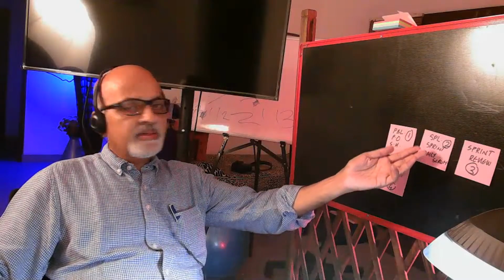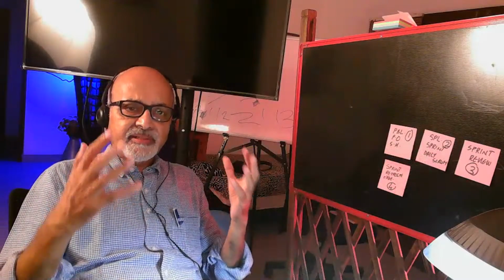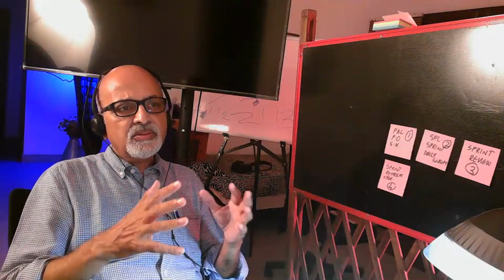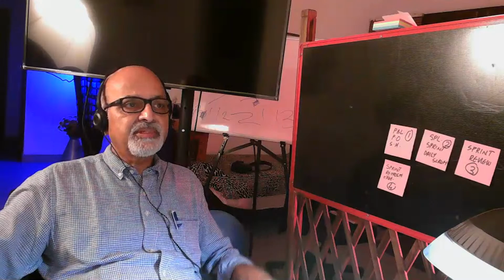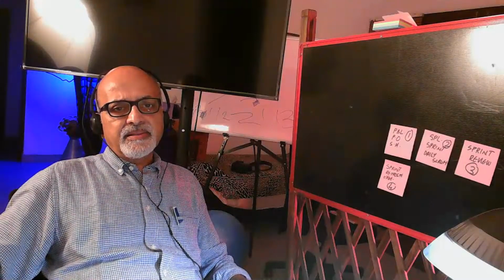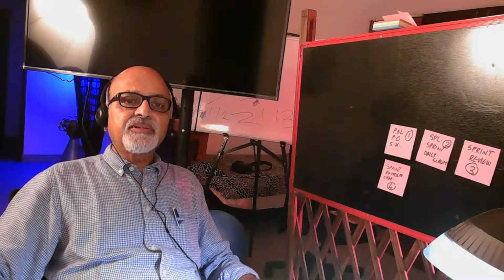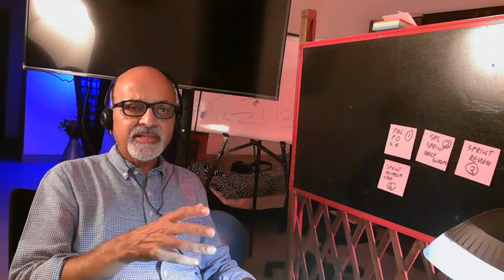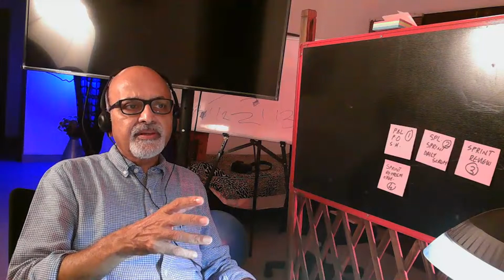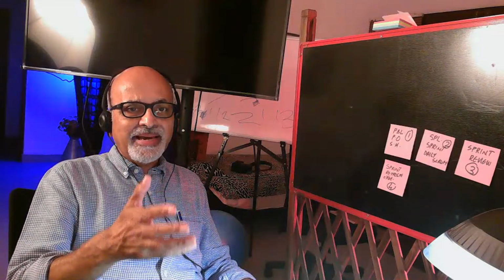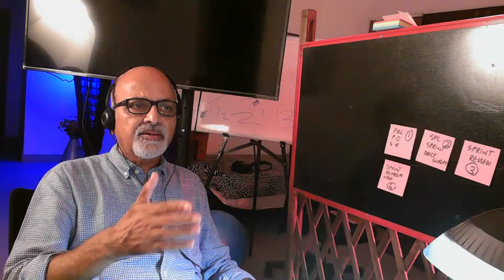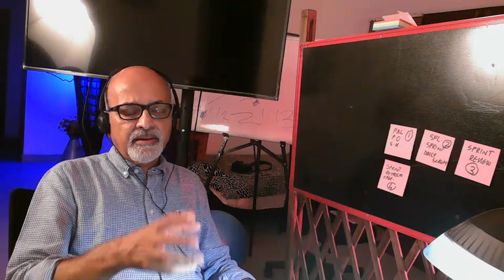Then during the sprint, every day we have a daily Scrum meeting. It is also known as a daily stand up meeting. It is a maximum 20 minutes meeting. We are talking about 10-member teams in Scrum. So here, each team member will get 2 minutes to talk, and they talk about three things,